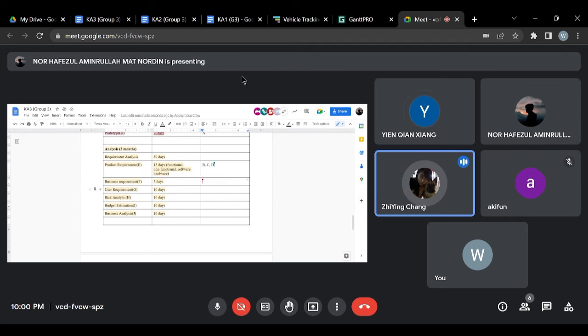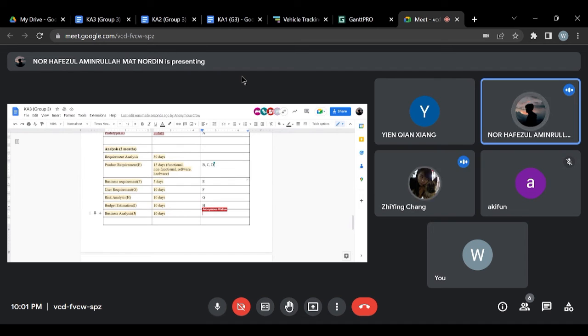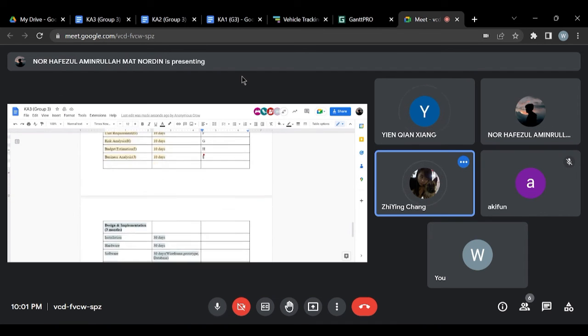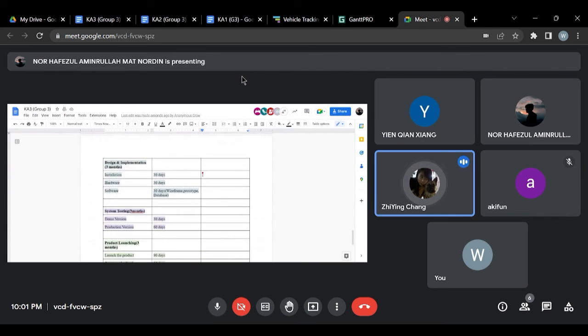So the business requirement is after the product requirement. So I put E. And then I think for the other parts in analysis, it's step by step, no more simultaneously. Just follow the steps. G, H, I. Installation is J.